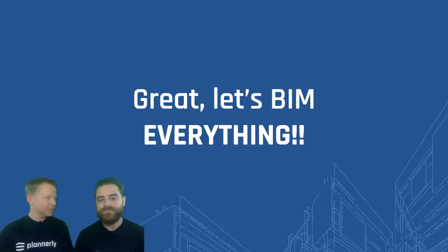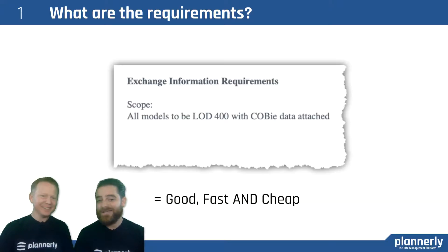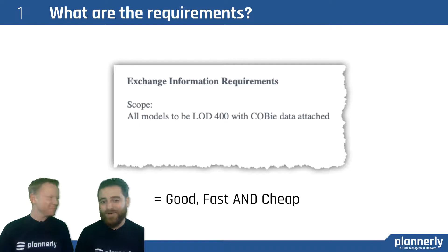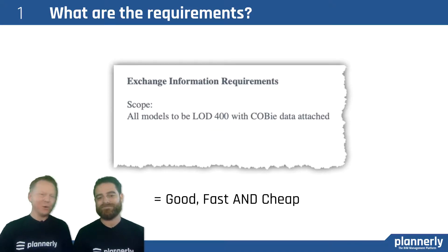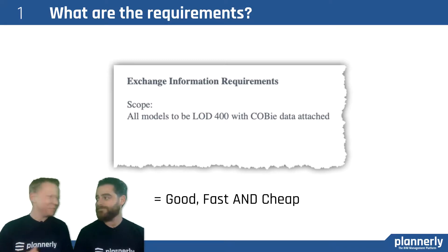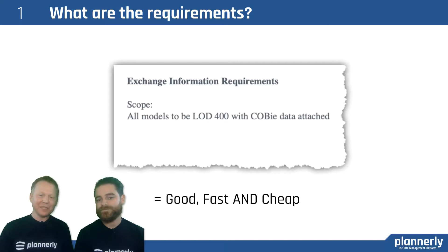Because you can use BIM for so many things, let's use it for everything — why not? Well, you might have already missed out on some opportunities early in design depending on where you are. You might still receive some very broad requirements. This is an example of some contract terms that an owner might, if they're not so informed, ask for. Asking for LOD 400 plus COBie is completely undefined and impossible to deliver — what they're really asking for is good, fast, and cheap all at the same time.